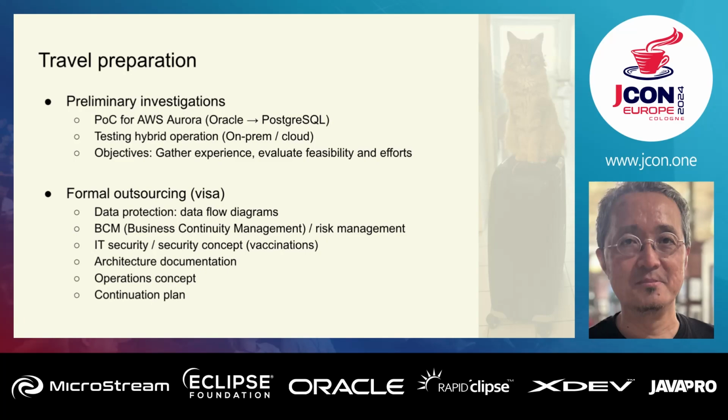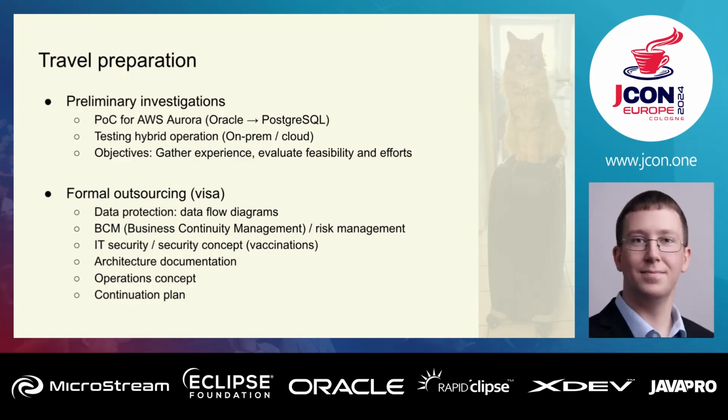Another thing that's very important, especially in Germany and especially in insurance companies, is the topic of formal outsourcing. You can't just take an application and its data and move that to the cloud as you like. That's not possible, because you have a lot of data regulations that you have to apply to, security concerns that you have to care about, and documentation that you need to get approved by certain instances, to apply to German law and European law. It's not that easy to do, and of course that contributes to the project in a huge way. So we will see later on.